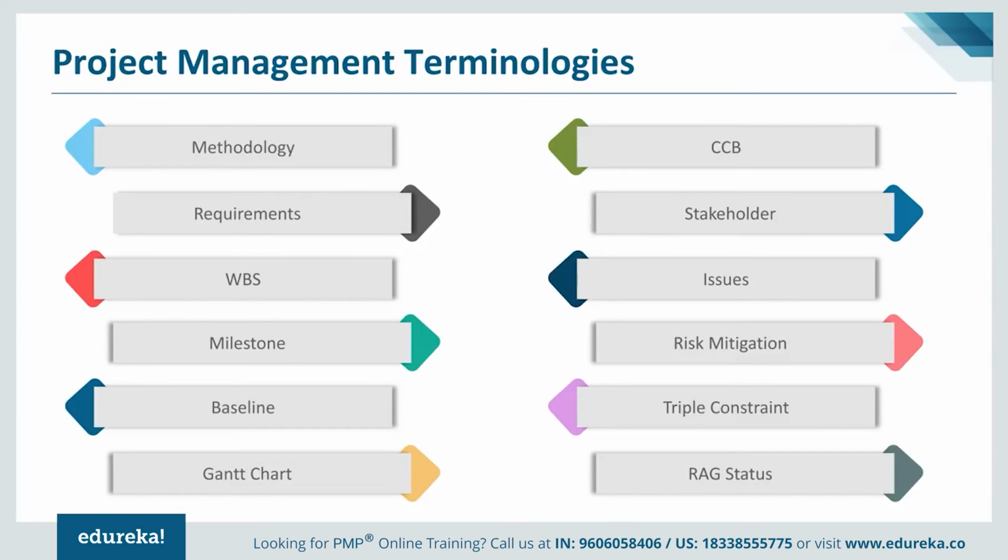Triple constraints of the project. In project management, typically, we used to talk about triple constraints in the beginning. Now there are more than three constraints, of course. But initially, we used to focus on three constraints, which are budget, scope, and schedule. So why are they constraints? Because even if you change one, at least one other will get affected.